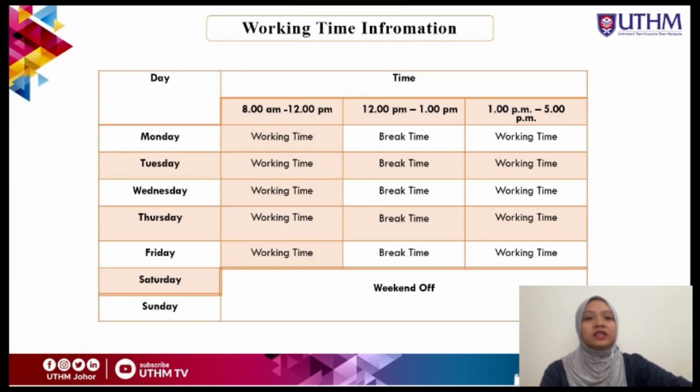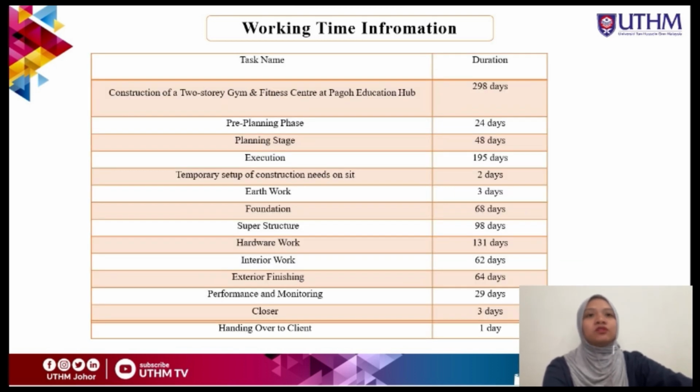Next, for the working time information, we have working days from Monday to Friday. First we have 2 sessions: the first session is 8 in the morning until 12 in the afternoon, and this is the working time. After that we have break time from 12 to 1 p.m., and after that 1 p.m. until 5 p.m. will be continued working time. Saturday and Sunday is the weekend, when the workers can have an off day and a rest day.